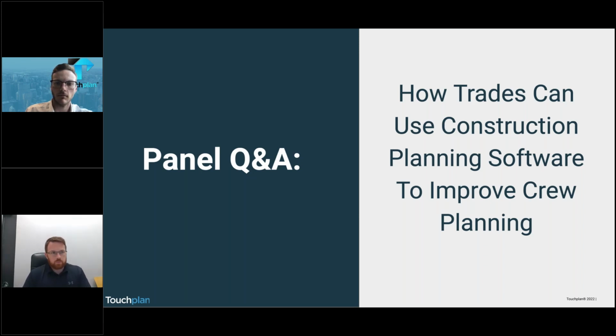So I guess what I'm hearing you say, Kyle, is that you guys are taking Touchplan and you're taking the general contractor schedule that may be 45 pages, and then you're handpicking your activities out, and then you're putting them on your plan. And as they start pushing activities out or trying to pull them in, what's on page 15 and what's on page 35 may actually stack on each other because they moved them. And now you're saying, hey, look, I've gone through your schedule and I've put it into my system, and now I can see that you're actually stacking activities, which is a no-no when you're hurting my manpower.